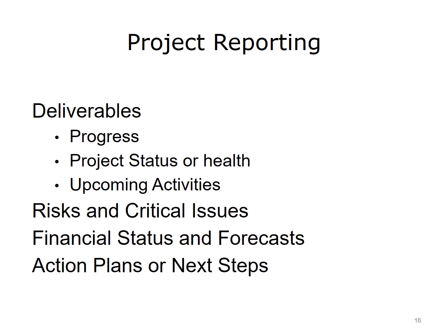One of the most essential elements of the effective coordination of the project is the dissemination of communication regarding the current performance to all relevant stakeholders. This reporting coordination is accomplished via an established performance reporting plan. Performance reporting refers to the process of collecting and disseminating performance information to all relevant parties. Typical information that is provided via reports includes the following: the overall health of the project. Is the project on time, on budget, and meeting quality or feature requirements?